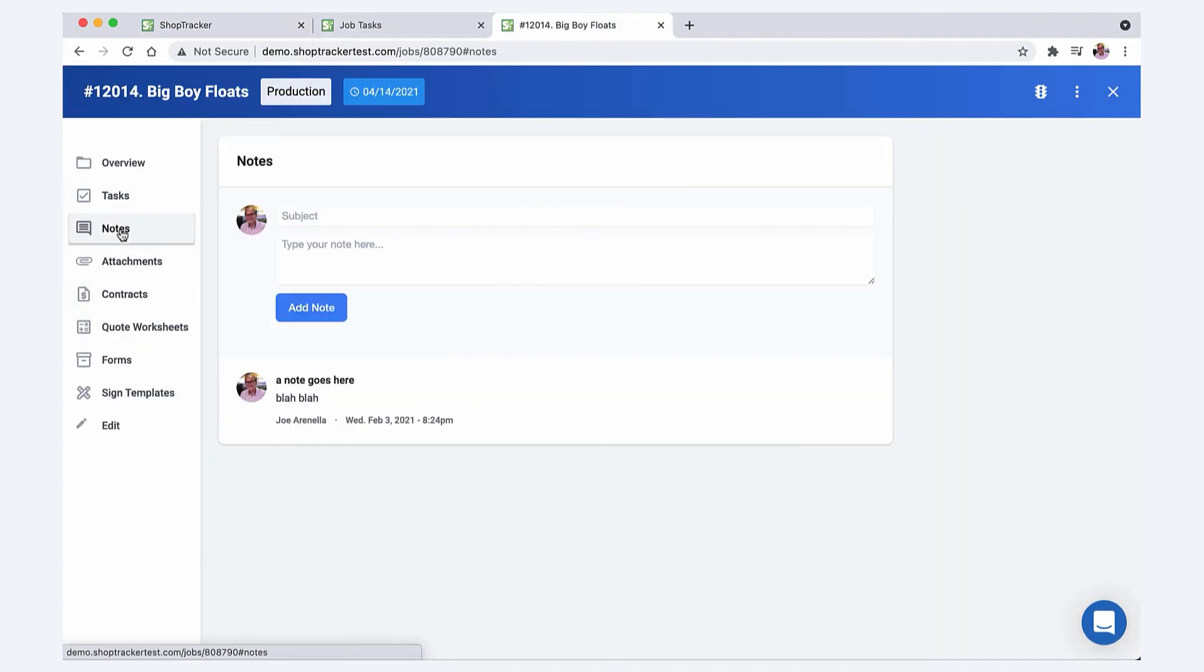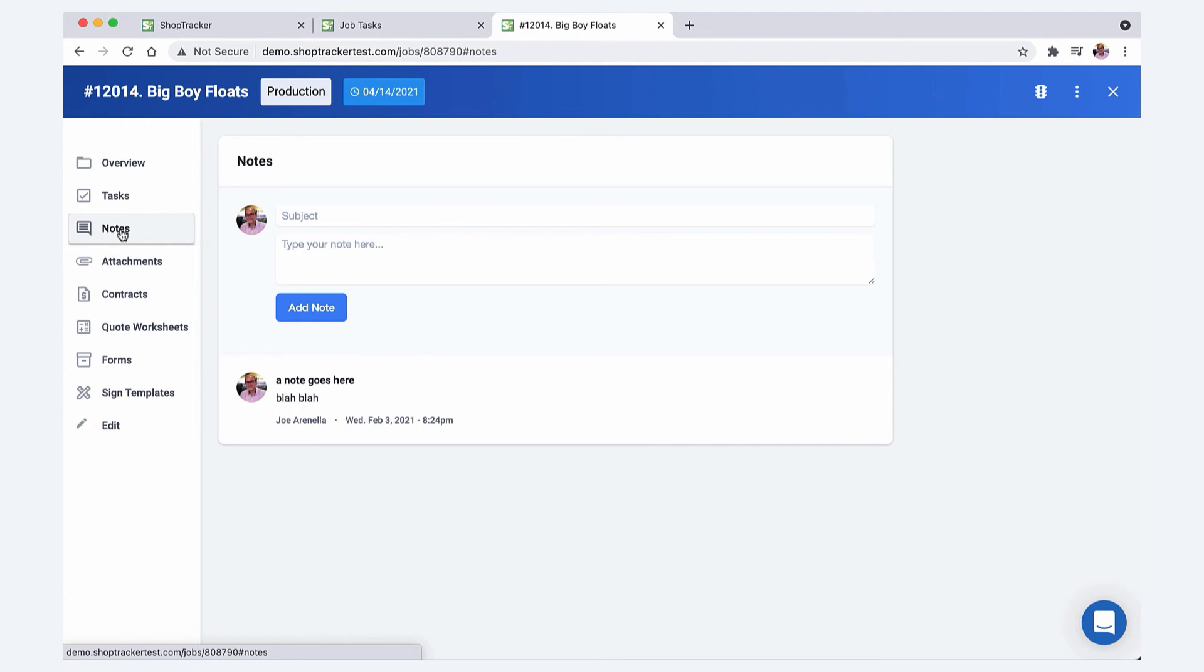You can also create notes on jobs. One thing that I did a lot is I used Gmail. Some of my project emails back and forth with customers, those threads would get really long. What I always made sure I did is anytime a customer would approve a change or a color change or an additional fee, I would always just copy and paste that and put the whole email into the notes and it would timestamp it. Then I always had that.